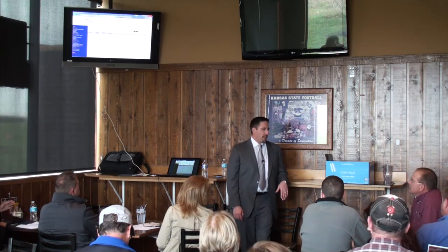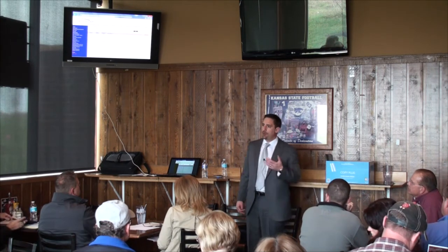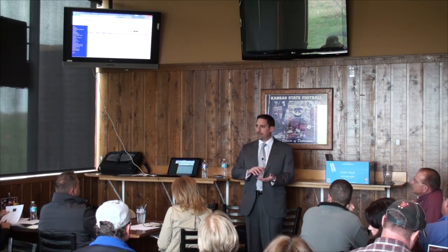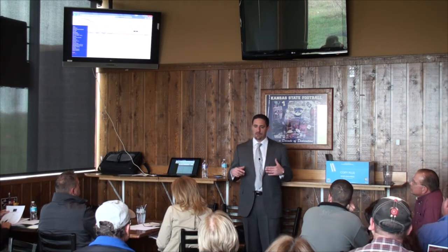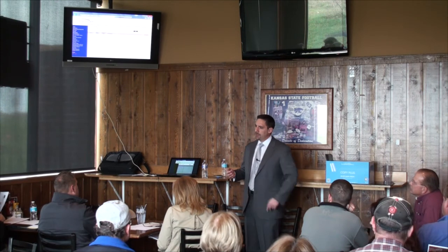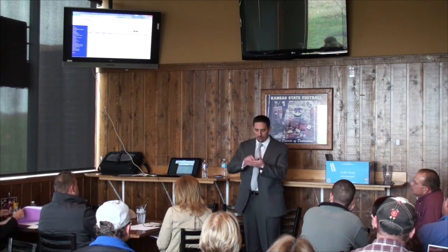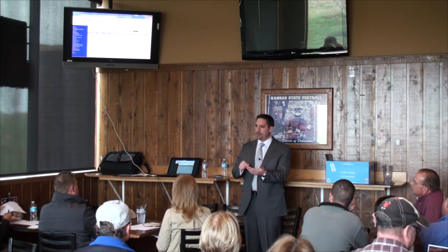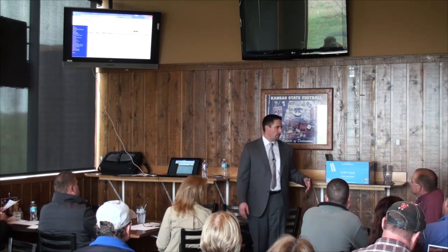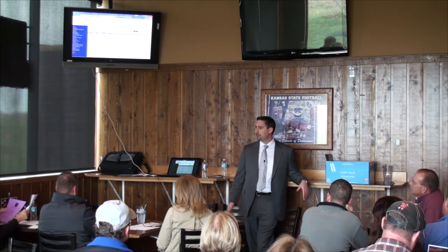Superintendent has a VPO screen. So if you have a super near you, you can call them over and say, can you enter a VPO for whatever, explain it to them. They can type it pretty quickly on the iPad and submit it. If it's within the range of approval, it goes straight to your dashboard and authorizes you to do the work. If it's over the approval limit, then it gets emailed to Steve or Paul, and then from their phone they can either change it, deny it, or approve it. The minute they approve it, then it goes to you. So if it's like an emergency or something, you could certainly get a hold of the back office, but the most efficient way that we want the engine to run is go through your supers.